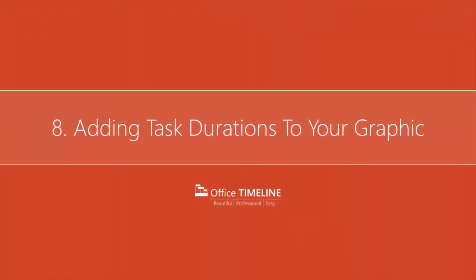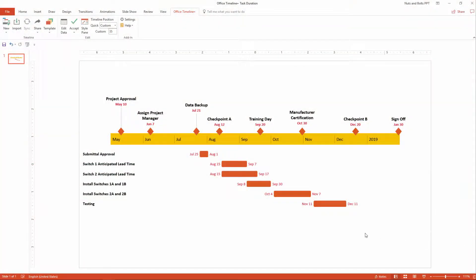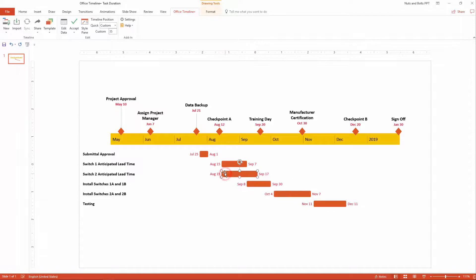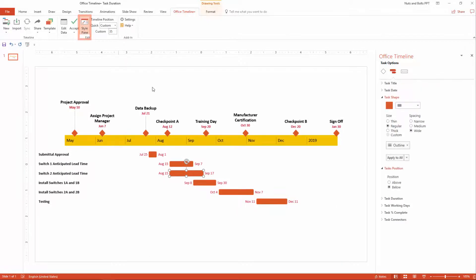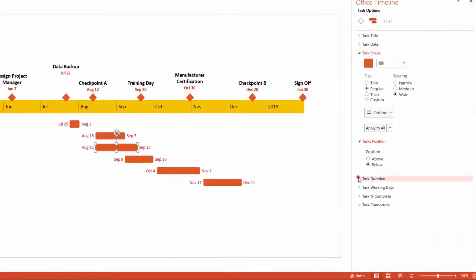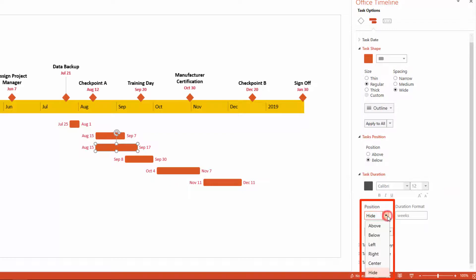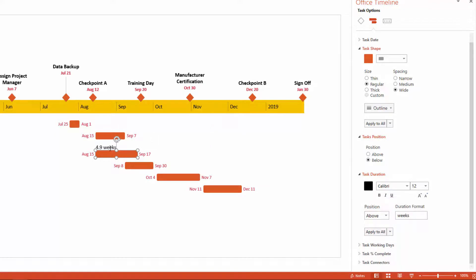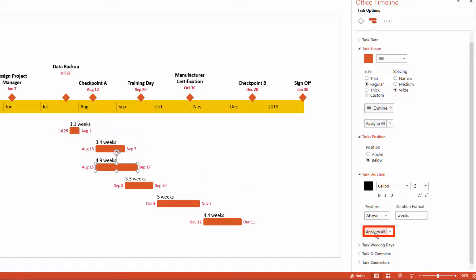Another cool feature of the Office Timeline Plus add-in is you can add exact task durations to all of your individual tasks. Simply select a task, navigate up to the Office Timeline Plus ribbon tab, open the Style pane, and find the Task Duration options. First, you have positioning options — above, below, left, right, or center of your task. I'm going to choose Above, which immediately adds the task duration in weeks to my task. To apply it to all other tasks, simply click Apply to All, and you can see the task duration for all of your individual tasks.